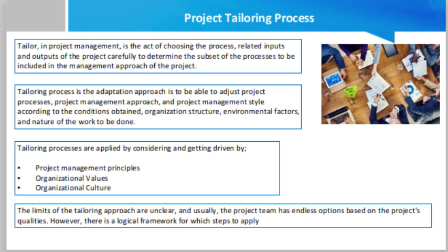Tailoring guidelines can help a project manager by advising that the activity do code review be performed only for certain types of programs, such as complex programs or external interfaces, and by suggesting the optimal form of the review, group review or one person review. The tailoring approach is similar to the table-based approach proposed by many persons.